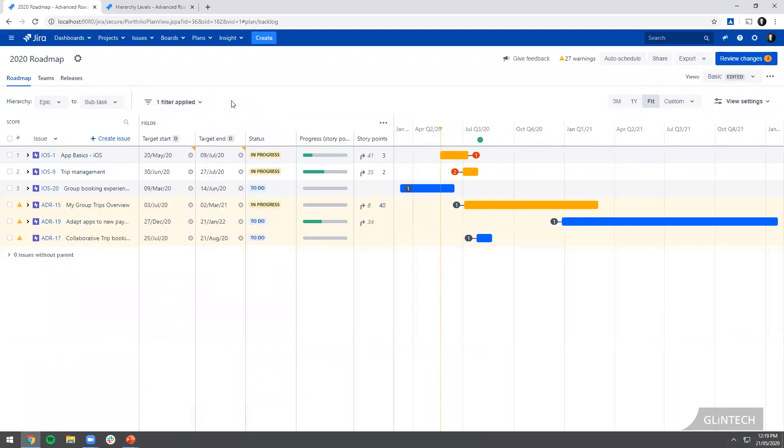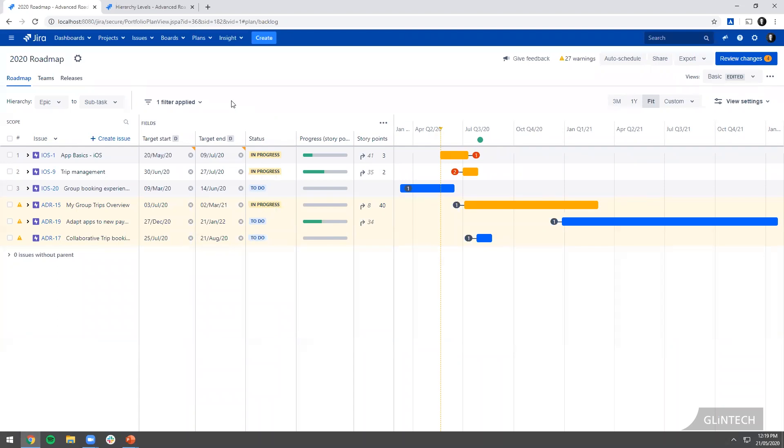If I was going to have a Scrum of Scrums meeting, this is what I'll do. I'll have my dependencies on show and we'll have it up on the screen. We'll go around a person from each team or each squad and we'll talk about the dependencies to make sure that everyone's aligned. If someone wants to start a piece of work in a particular sprint or iteration, the people who are dependent are aware of that and do their work in the right time.